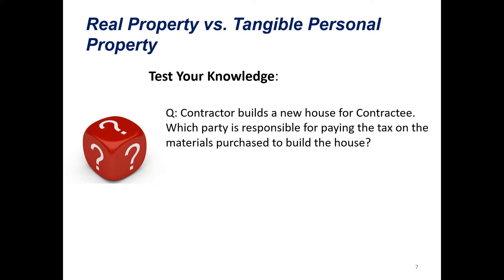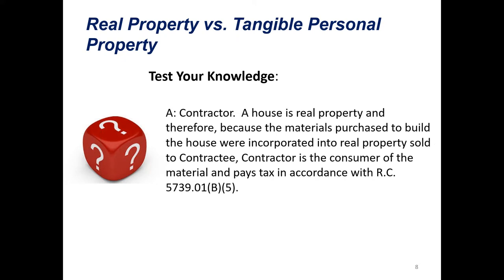First test your knowledge question: A contractor builds a new house for a contractee. Which party is responsible for paying the tax on the materials purchased to build the house? Well, a house is going to be typically considered real property, so the contractor is going to be considered the consumer—the contractor has to pay the tax on all those materials. Correct. The contractor is going to be responsible for paying tax on that material. The house is real property, and because the material purchased is incorporated into that house and sold as real property to the contractee, the contractor is going to be the consumer who pays the tax in accordance with ORC 5739-01-B5.